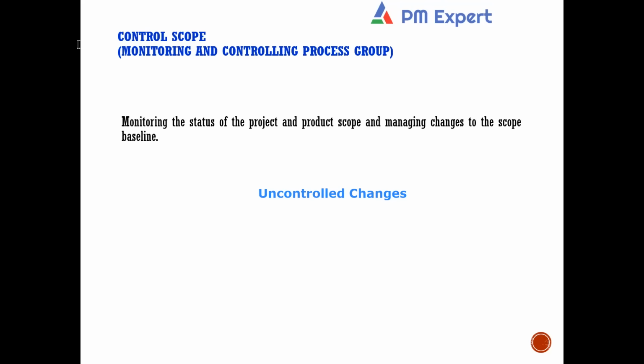Yeah, absolutely. Now see, suppose Aryan is a delivery guy, a team lead or a delivery manager. In order to please the customer, if Aryan develops it, tell me, will it be an uncontrolled change or not? Yes. This is also called gold plating. This is an uncontrolled change.